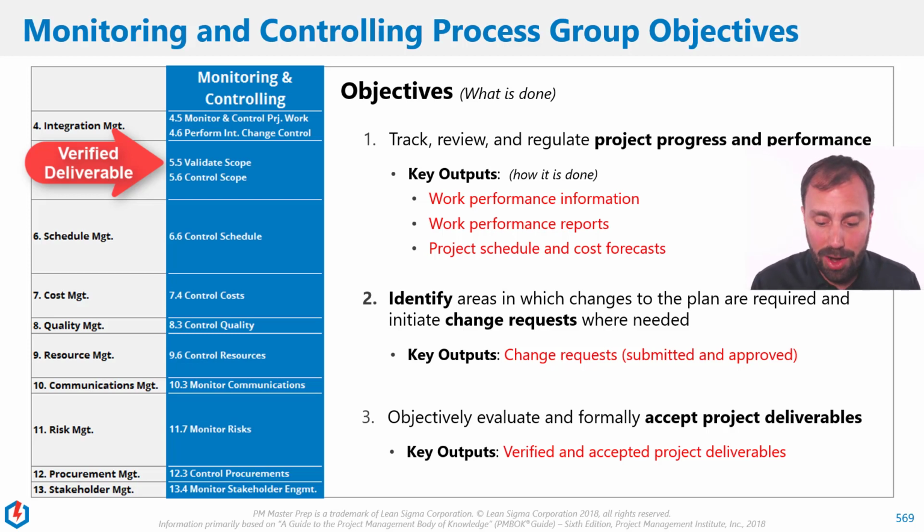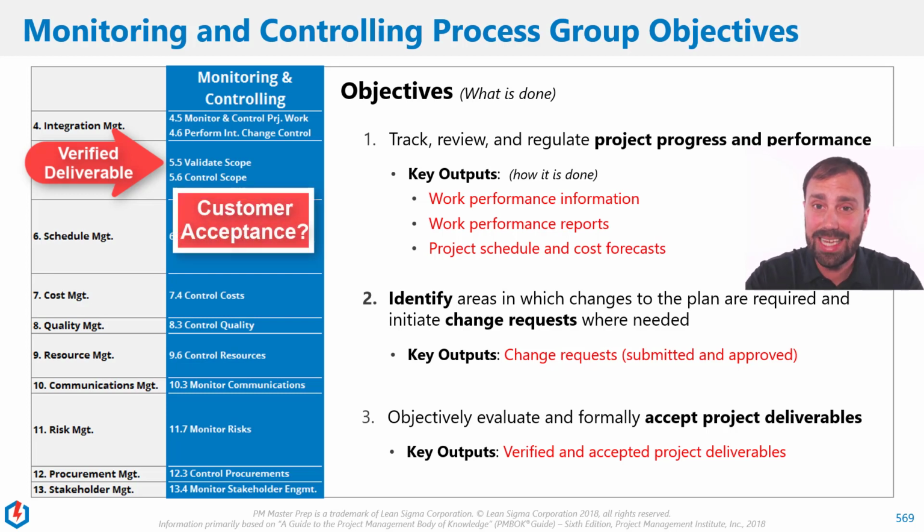And then that verified deliverable gets evaluated by the customer. Does the customer accept it? That's a pretty big one, right? They didn't take it yet. They're going to do that in the closing. They didn't take it away. We haven't handed it over, but we're just saying, hey, take a look at it. We work it with them.